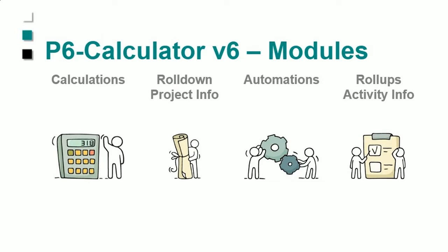Let's say you put it at the resource, or at the expense or the steps. It sits there and it's not usable at the activity, at the WBS, at the project, for example. So we've automated that, so the levels that we know in the hierarchy in P6 can have roll-ups, from the bottom: resources, expenses, and steps. We made those usable.